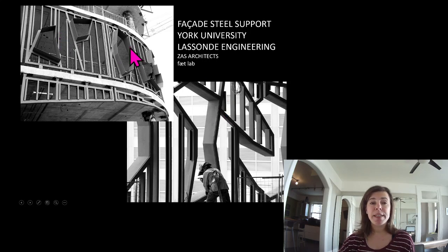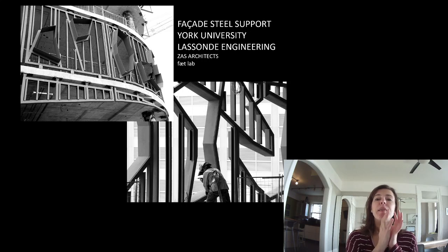So what I did was I ended up producing drawings that exported basically cut files. They could take the files and literally cut the steel directly from my files. Normally the process in Ontario is the engineers design it and produce drawings that are more or less a representation of what they want. The fabricator builds a model that is the precise cuts that they want. So we took out that step and brought in my scope of work and saved the project a year of timeline, essentially.